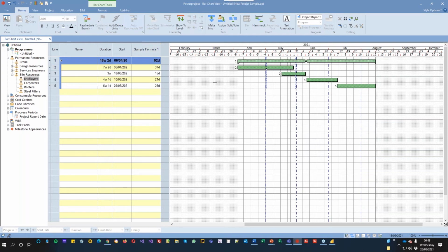Now, it might seem strange that I've gone to all that effort and I've just typed in duration. But the advantage here is this duration is not editable. So you could actually add columns in just to make those columns read-only so people can't change them. There may be only certain fields you'd want people to change, which means it becomes really useful to create a table that people can't edit, but can edit certain fields.